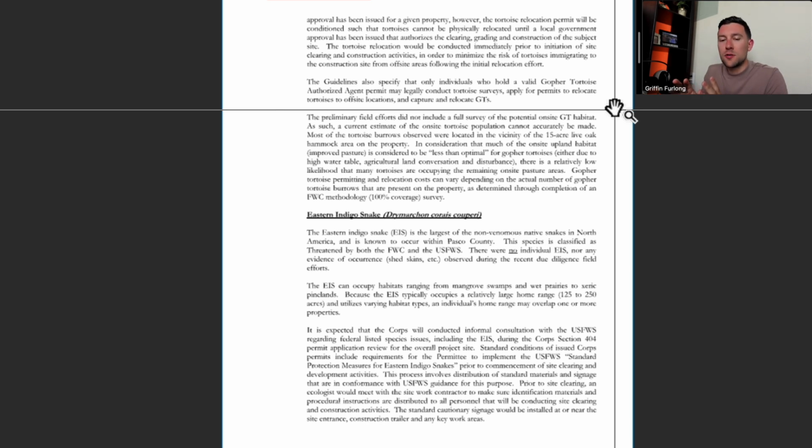But then there's a whole other side of the permitting aspect. Being the project manager, I have to understand if there are any more wildlife surveys that are required, or any additional permitting that's required from an environmental standpoint, because this could potentially impact schedules. For instance, like I said, if there was a bald eagle's nest, I would have to make sure we really understand the requirements for that, and if we are even allowed to build within the vicinity of it, or if we have to start construction at a certain time. Again, that's why it's really important to coordinate with your environmental scientist on the team.